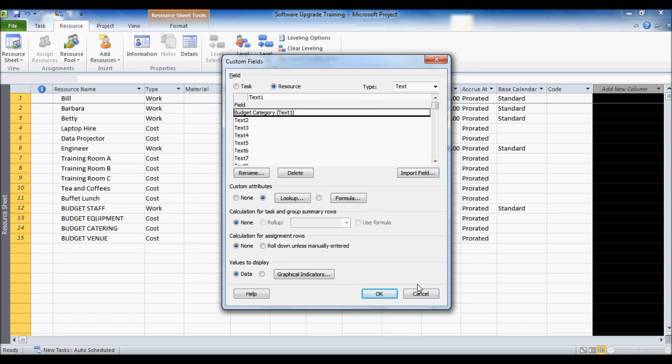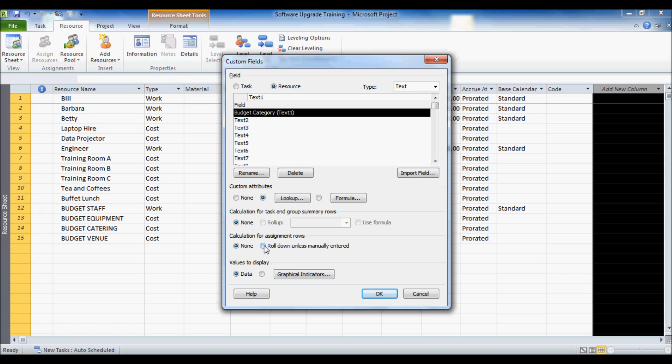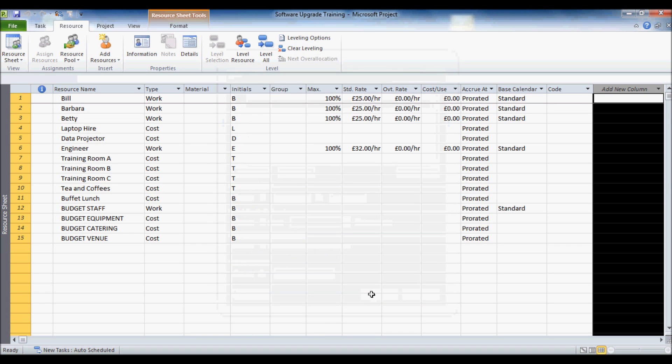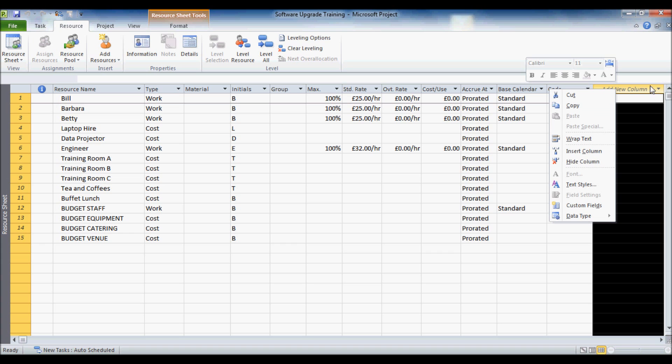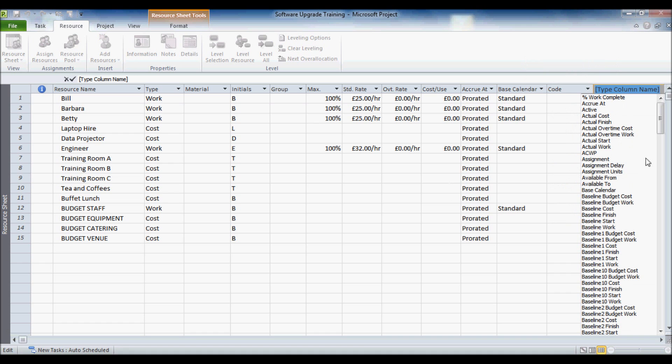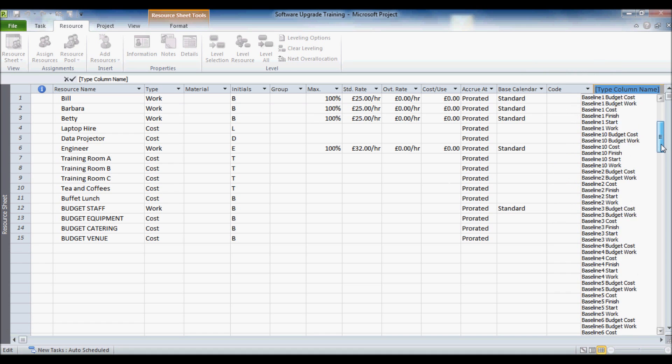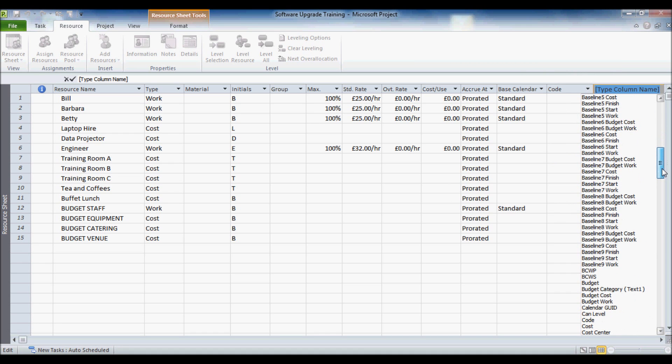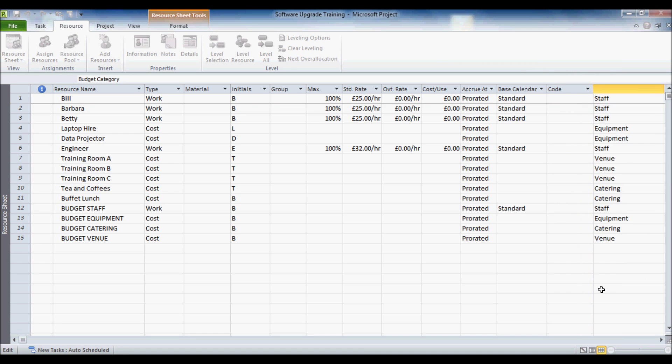So if I click on lookup, and what I want to do is roll down and let's manually enter calculations for assignment rows. So you will see that later on in the resource usage view that we are going to use later on, how that affects that. Click on ok. Now what I want to do is then insert that new column that I have just created. So right click on that new column, insert column, somewhere in this list, and this list is my budget category field. There we are.